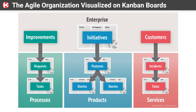Another question: is throughput the same as velocity? Yes. Velocity helps your Scrum team plan your next sprint based on your average velocity — you do the exact same thing in Kanban but using throughput, which is an average of cards getting done. Velocity in Scrum and throughput in Kanban are used the same way to plan your next round of work.